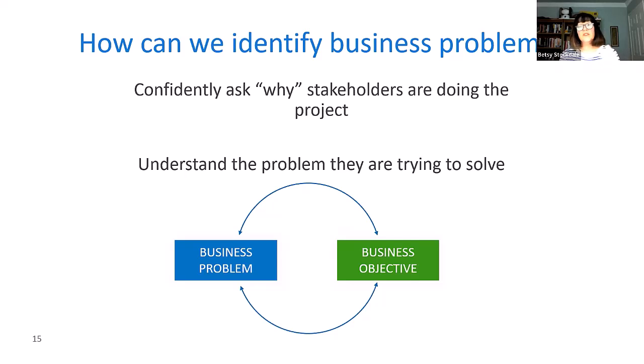Now, sometimes you will start with the objectives and maybe your key results, but then how do you know you've got the right ones? And this is where asking why comes in handy. It helps you to identify the business problem that you're really trying to solve for. By asking why is that an objective, it gets you to the business problem that they're trying to solve. This way, it helps you ensure that your objectives and your key results aren't tied to something that's not necessarily important to the business. Now, to be fair, I'm not advocating that we act like toddlers and go, why?